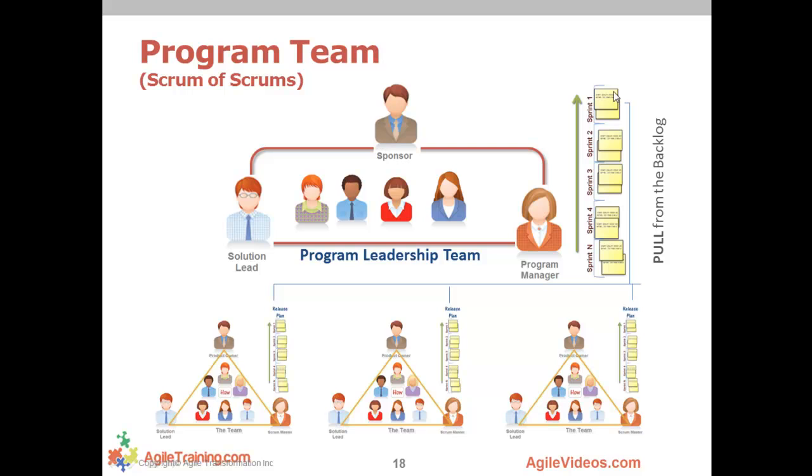They realize that they have a backlog, they probably have a program management wall themselves. They have to have daily stand-up meetings with this team, or potentially, I have some program teams that don't do it every day, maybe 3 times per week. They bring the members of these teams together in combined demos, combined retrospectives.